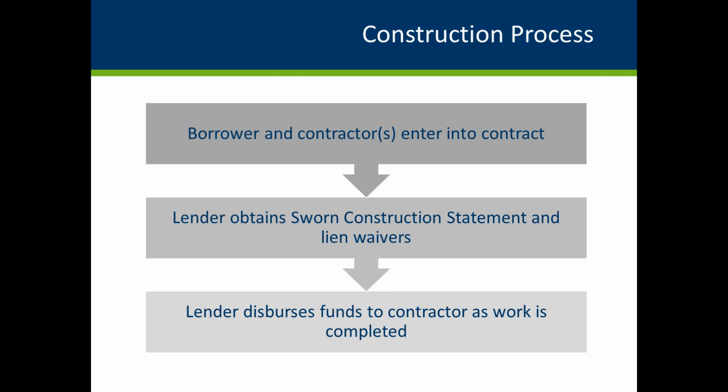Please note that Minnesota Housing does not provide specific forms for sworn construction statements from general contractors or for lien waivers. Each lender should use their own form. Ensure that the lien waivers list the actual dollar amount and whether the waiver is for a partial or payment in full. Make sure that the invoices reflect the actual amounts listed on the bid.